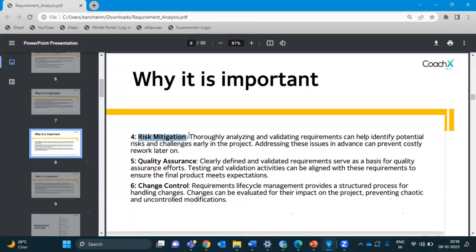So whenever I say that I'm going to develop a data science project which would be running on Azure, I have a risk. What risk is that? My data set is not connected. So the risk I would put is that the integration of the internal data set is not connected with this new cloud-based tool. That's a risk that I want to highlight at the beginning.